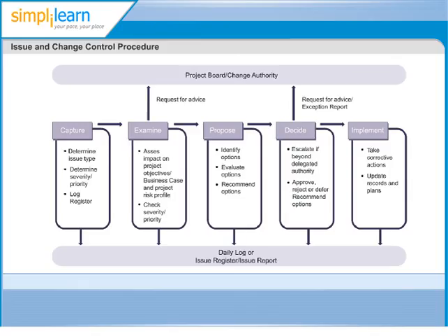Issues being managed formally should be entered in the issue register and given a unique identifier. An issue report should be created to capture what's already known about the issue. It is often useful to ask the person who raised the issue to create the initial issue report.